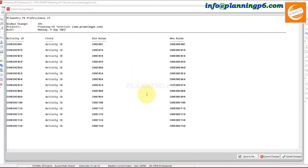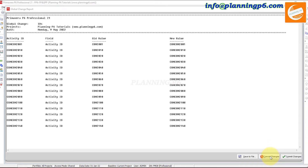Primavera will ask if you want to save the log file. One important thing: if you commit changes, you will be unable to undo them. So if you are not comfortable, you should first create a copy of your project. If you are comfortable, you can proceed to commit from here.